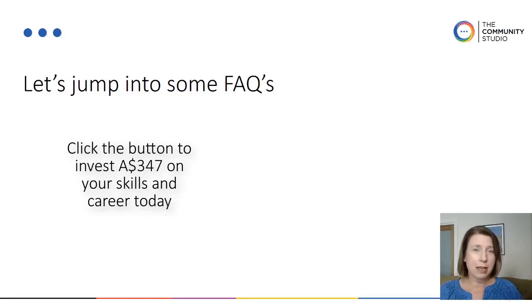That might be okay if nobody out there in your stakeholder groups needs to be worked with in a much more active way, but that is incredibly unlikely. What is likely happening if you are working with them in that media and comms space is that they're probably just getting frustrated. And if you are just on the guinea pig wheel of trying to push out more and more information and hoping that will satisfy them, that is a sign that you need to come back and do more engagement planning and be more strategic about how you are working with your stakeholders.